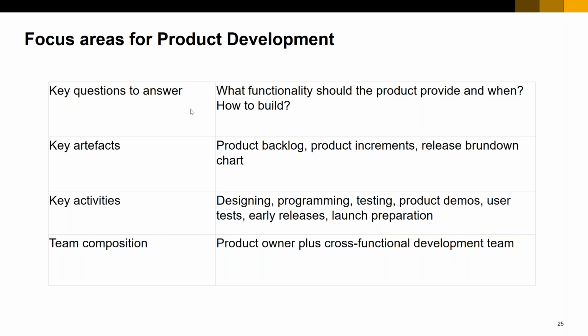Some of the key activities that happen in this whole product development phase, for a typical software product, there is definitely a lot of design discussions happening at the beginning, then the actual coding of the product, then the testing, there is a product demo happening. What we call in our organization, for example, a guided beta, which means we deliver the software to the customer for a free of cost trial, only for a fixed window. That window is typically only 3 days in our case.